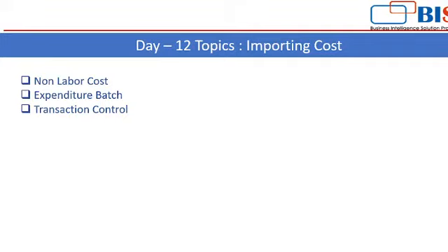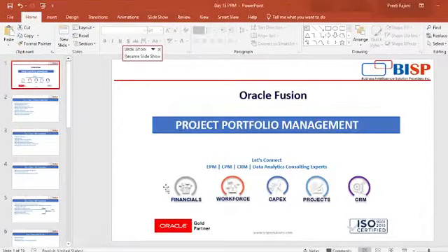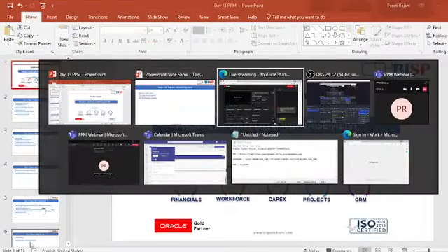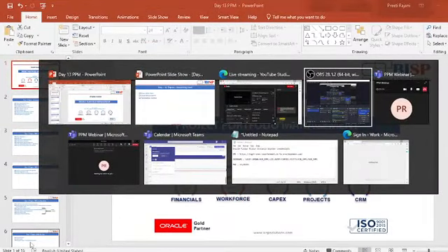Say I have 1 hour rate for that equipment as 50 and my project A is using that equipment for 10 hours. So 500 will be charged to that project. So we will see how to do the configuration for the same. Let's move to our application.